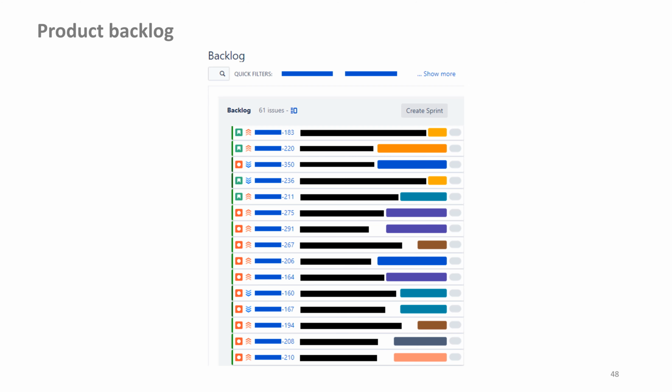Here is a Jira example from practice. The backlog is sorted according to certain criteria. What is at the top is most important, and the further down, the less important it is. You can also categorize the epics by categories. The stories from the backlog are taken into the sprint backlog in sprint planning. Common tools are Jira and Azure DevOps.